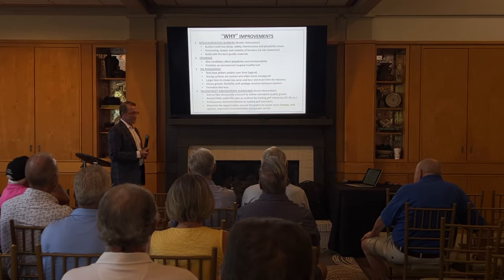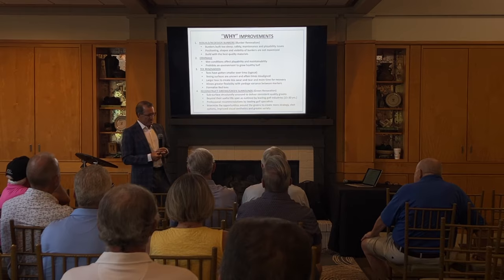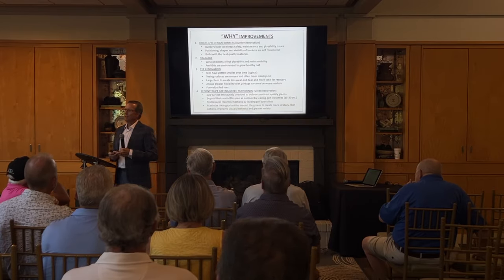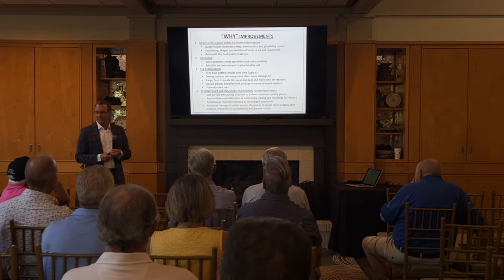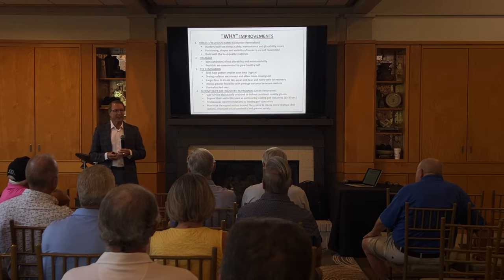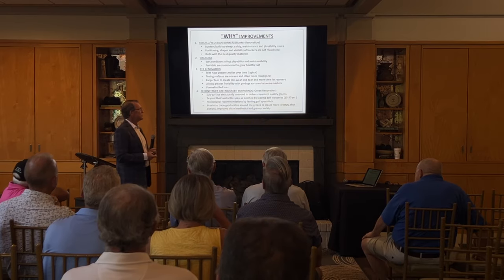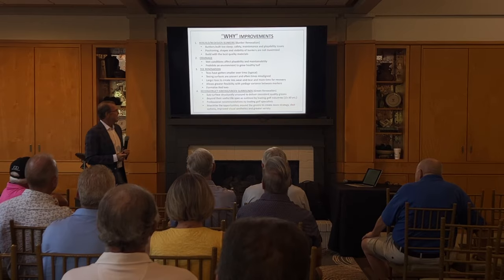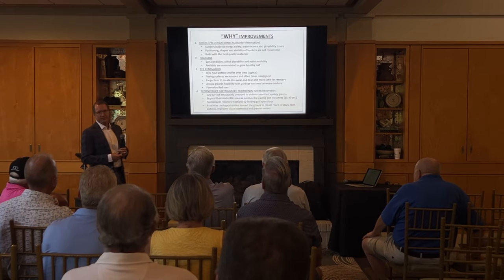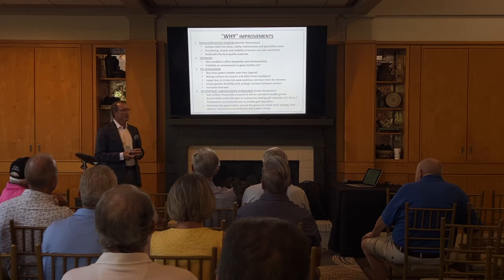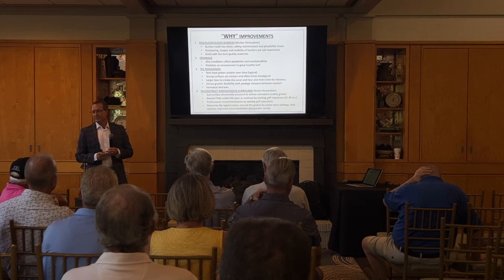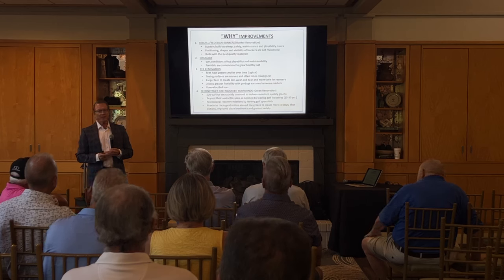Tee renovation. Once again, this was a big topic, that tees typically get smaller over time. Alignment gets adjusted just because of mowing patterns. So we want to take a good look and recommendation of a tee renovation, which would be basically realigning the tees, subsurface drainage, sand capping, and resodding.